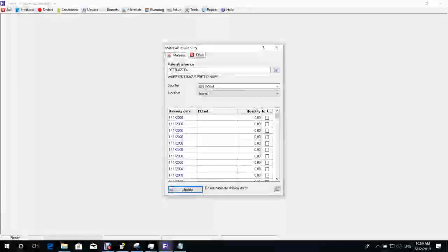Same time, yes, because when I make a start time action plan for a BO, we ship after 90 days. I have no fabric and accessory in store. There is still something. We'll buy the fabric and accessory, and we'll get it after 45 days.